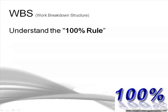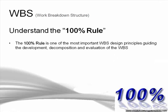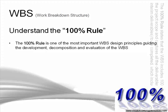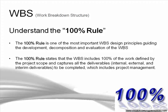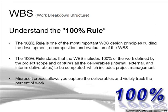Understand the 100% rule. The 100% rule is one of the most important work breakdown structure design principles, guiding development, decomposition, and evaluation of the WBS. The 100% rule states that the work breakdown structure includes 100% of the work defined by the project scope and captures all of the deliverables — internal, external, and interim deliverables — including your project management deliverables. Microsoft Project allows you to capture the deliverables and visibly track the percentage of work.